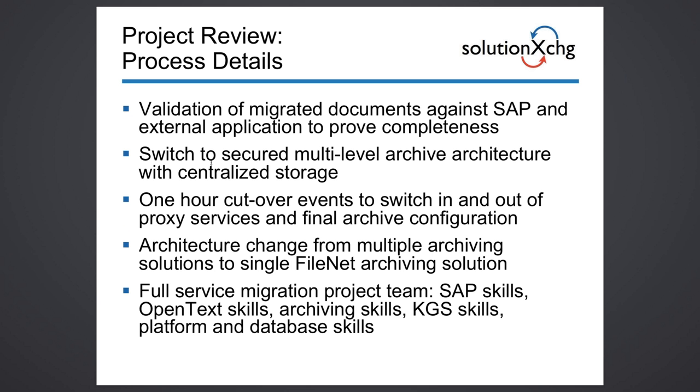Again, some of the details of what we did, I already mentioned that we validated each migrated document against SAP, against the external application to prove that we have completeness. We switched to a secured multi-level archive architecture with a centralized storage, and we managed to keep the cutover events to a bare minimum. And it says here 1 hour.